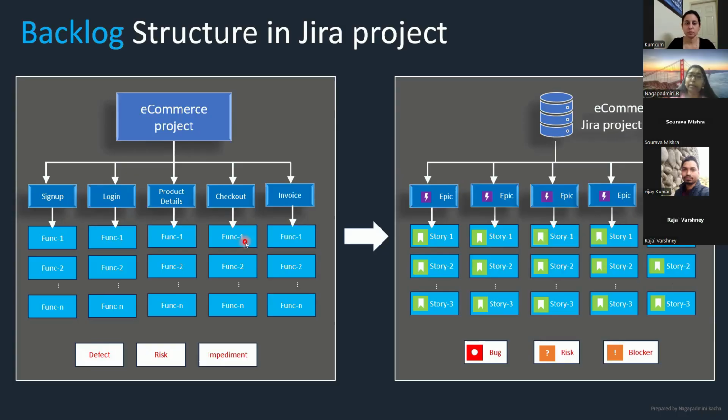And then the functionalities, I'm just breaking down into stories. And I may even go to the next sub-level, that is subtask, or sometimes maybe it is a one-time activity, so I can use just a task. Mostly stories are used where you want to do typical development activities. They are dependent on each other, and you want to have a continuity of the functionality flow.